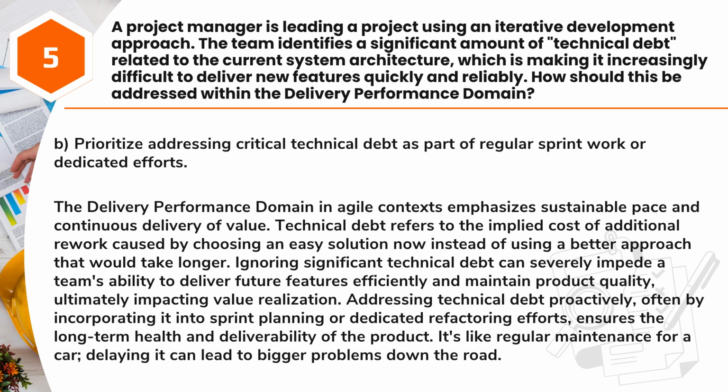Ignoring significant technical debt can severely impede a team's ability to deliver future features efficiently and maintain product quality, ultimately impacting value realization. Addressing technical debt proactively, often by incorporating it into sprint planning or dedicated refactoring efforts, ensures the long-term health and deliverability of the product. It's like regular maintenance for a car, delaying it can lead to bigger problems down the road.